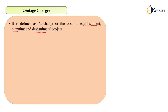What is establishment? For example, in a construction project, you may require a security guard and a cabin for the security guard. You will also require planning and designing costs. So all these costs will come under the category of Centage Charges. They will also include supervision charges — those costs required for supervision at the site.